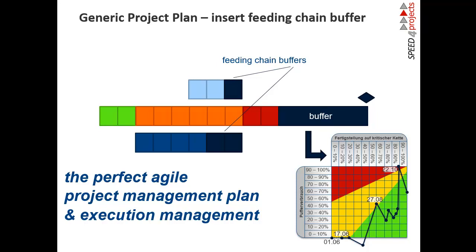In the next tutorials, it's all about this buffer. Critical Chain heavily relies on these fever curves. On the x-axis is progress over time, and on the y-axis is buffer consumption. Every day you get a point in this curve to see how much of the buffer is left. As long as you generate more progress than buffer consumption, everything is fine. In the other way, it's red and something has to be done. That's all about the buffer.